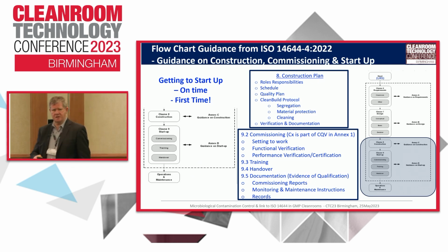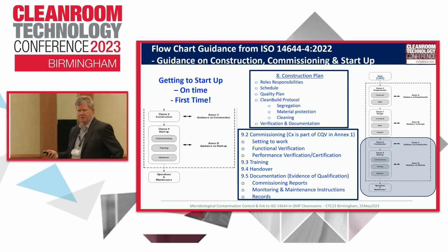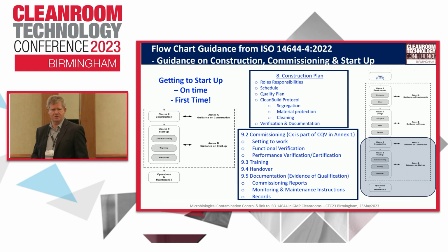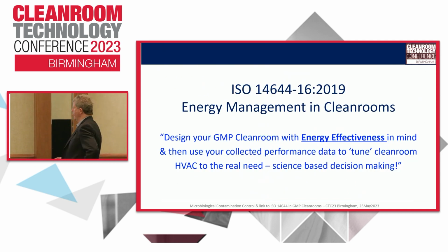Notice the words DQ, IQ, OQ, PQ are not used here. We use the word verification. Testing. What am I accepting? Because when you build a clean room, it's a contract. I'm putting a wall in, I'm putting a drawing in, and you go off and you verify it's against the drawings and specifications. You scare and confuse people when you use the words qualification and validation. I'm not saying contractors don't understand it, and you guys are all in this area here, but you really need to get it down to verification and then understand you're part of a wider plan, okay? So again, -16 is very important on that side.